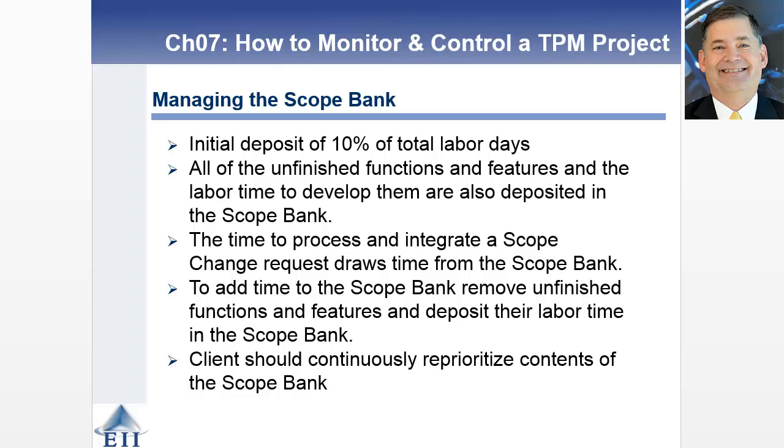So there's this capability of saying these are the most important of the changes in the bank, and you can add them to the project and then make determinations of what is in scope, what's out of scope. But you've created this capability for the client to make decisions and at the same time be constrained to 5-10% of the project in terms of what those changes are going to be.